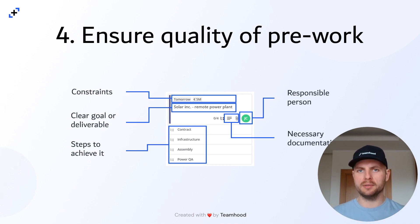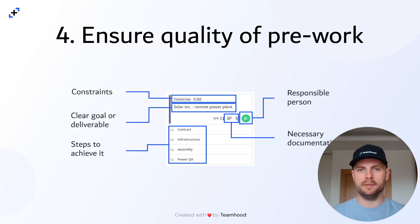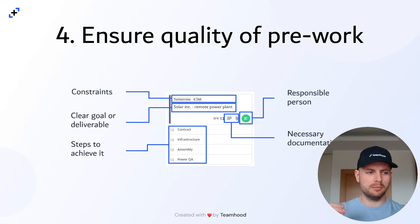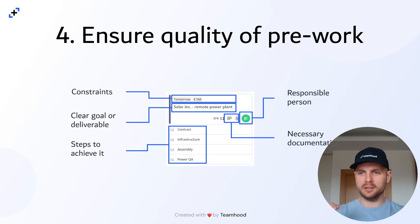At least one person needs to be responsible — one person is the golden rule, because if there's more than one, nobody's responsible. So there needs to be an owner of the actual work. And if it has documentation, examples, or specification, this must be as close as possible to the actual work item. Ensure that a certain quality bar is met. If you keep doing that, you will be pulling more items that get finished successfully and faster, and you will be able to see the positive change if you've been measuring how fast you can deliver.